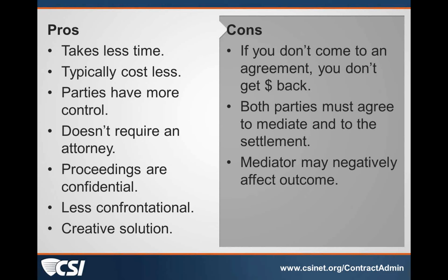If the contractor walks, whether it's because of arbitration or some other reason, that's what the performance bonds and payment bonds are there for. On public work, most of the time it is required, but if you are doing private work, I always recommend that they require the contractor to supply those bonds. The owner ultimately pays for them, but it's a great insurance policy. And I think that if you're in a circumstance where you don't have that